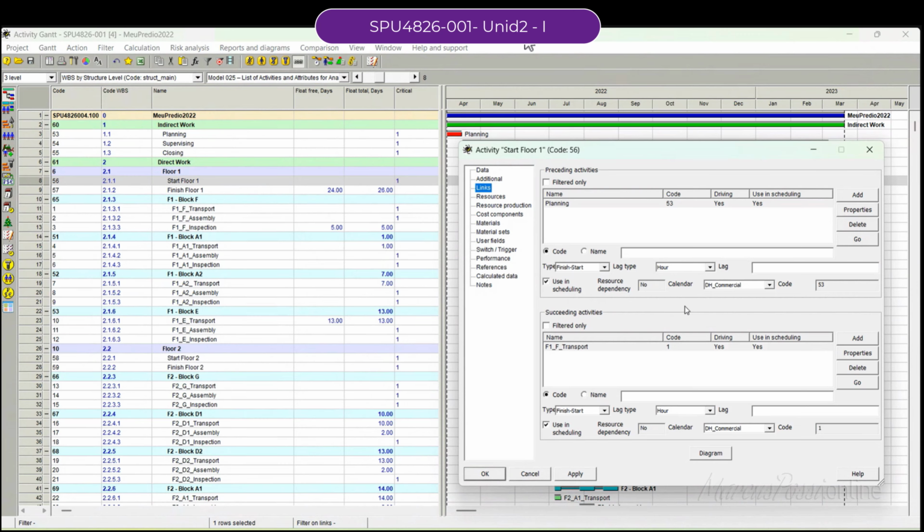If your next team works on Saturdays and Sundays, it will have to work. Otherwise, the traditional calendar will make you start on the next Monday. Yeah, I just got that those sections are kind of tricky in scheduling. I know, but sometimes it's pushing your schedule and it's not real.